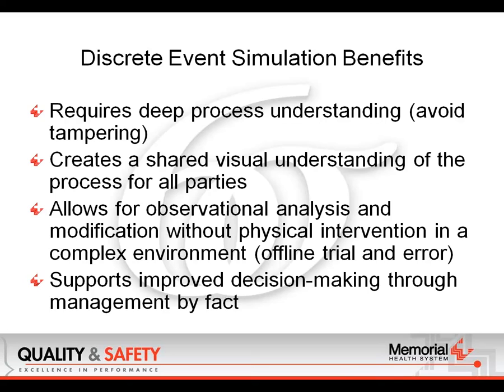We started, I'm trying to think of when I first did this, about 1.5 to 2 years ago. Now, I had done this in a previous healthcare organization. I'd done some simulation work, so I had knowledge of the process when we brought it here. Advice I would give is probably model something that currently exists first, even if it's a fairly simple process. And you can really gain buy-in by showing how you can match the real world by developing a current state process. And then when you show it to the stakeholders, work with them, get their buy-in, have them give you plenty of feedback. They're looking at the different parts of the simulation, show it to them. Have them verify its validity, and that's going to get you a lot of buy-in.